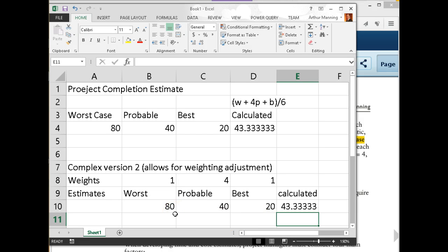The thing you want to keep in mind is when you're estimating projects, you don't want to push your schedule. You don't want to miss the schedule. So you always want to do a conservative estimate and don't be too optimistic. You'll look bad even if you had a good system, but you came in late. It's always going to be a black eye on your project management. So always be conservative. That means you go with a longer time. It's a lot better to say we came in ahead of schedule than we came in behind schedule. So if you're wrong, you want to be wrong on the side of a longer estimate.